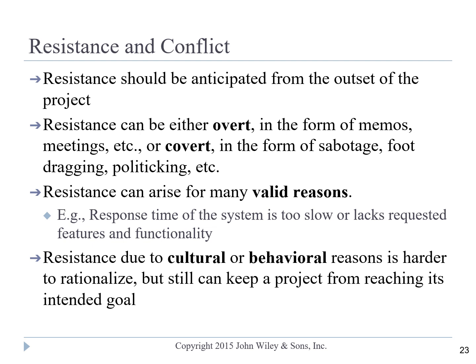And sometimes the resistance is due to cultural or behavior reasons. I shared with you the example with the clerks of the court and forming the advisory group to make recommendations for best practices to their peers, the other clerks. If we had done it another way, meaning forcing or dictating the best practices from the administrative office, most likely that would not have been successful.